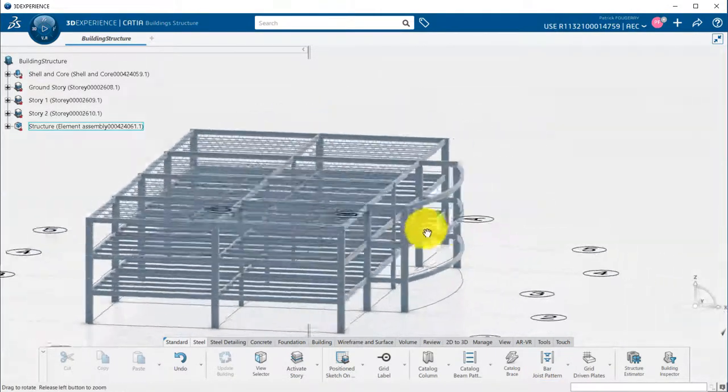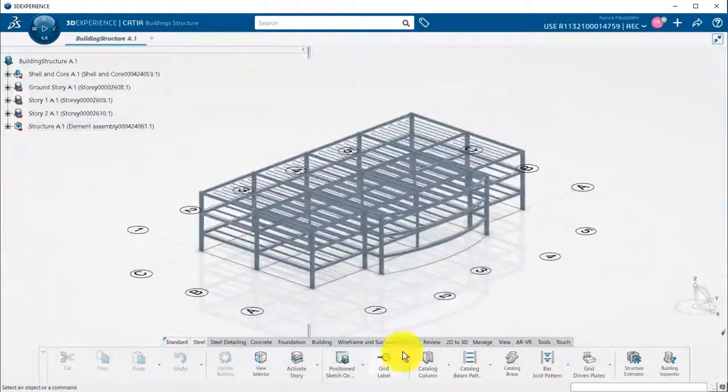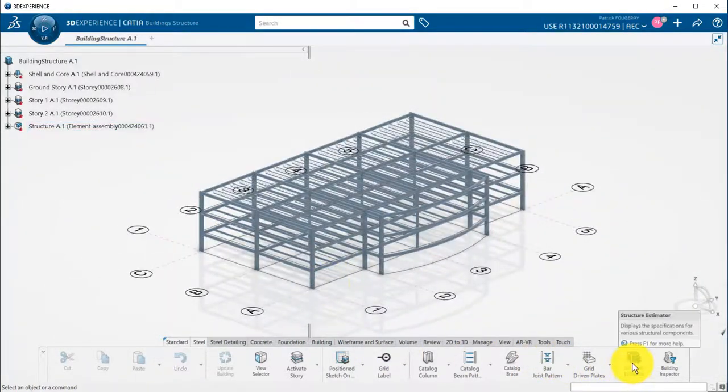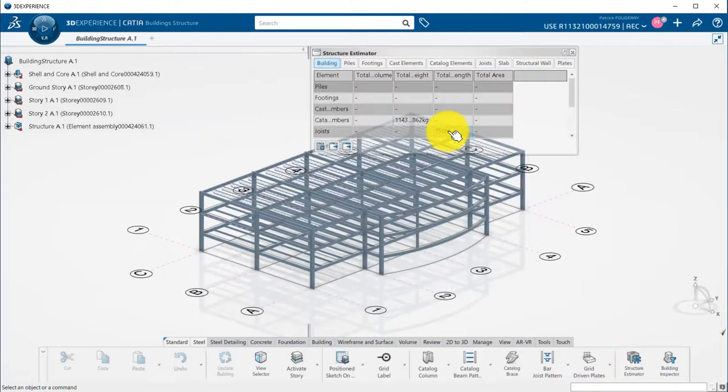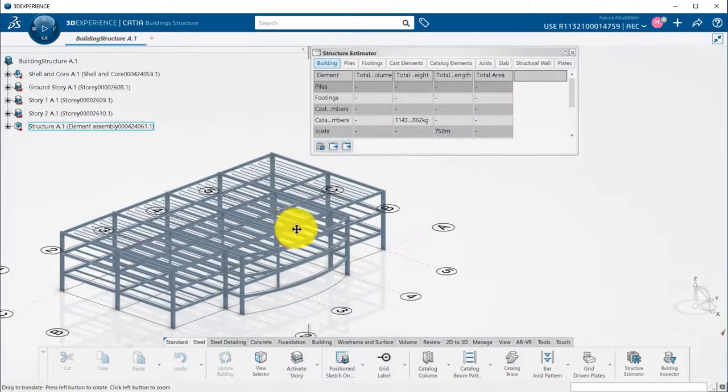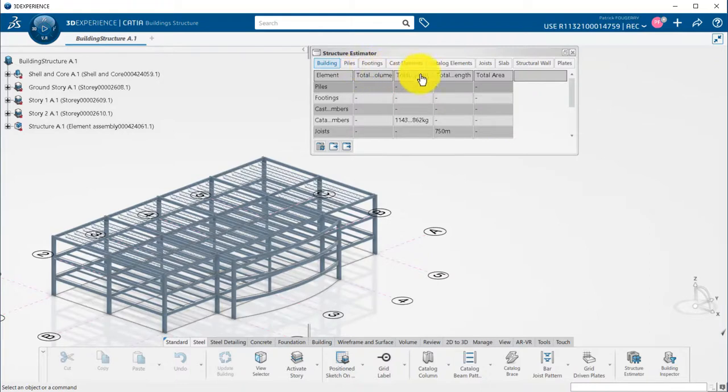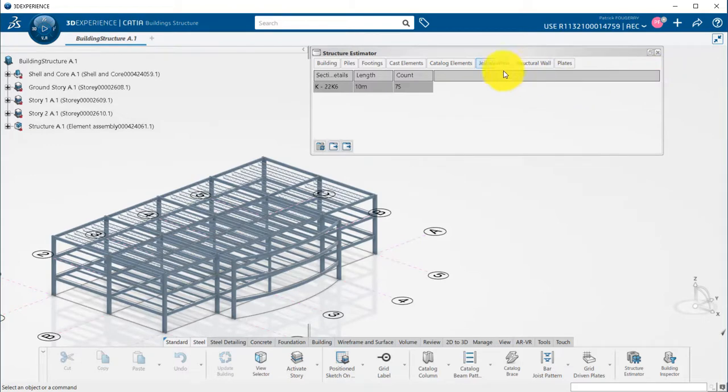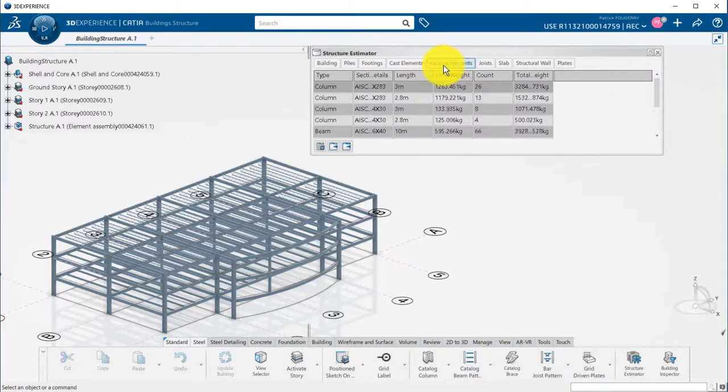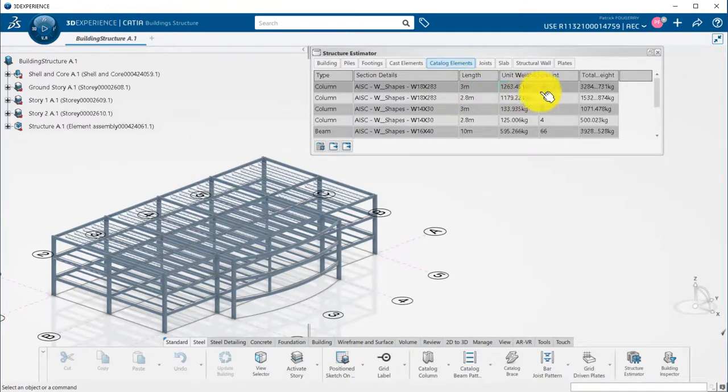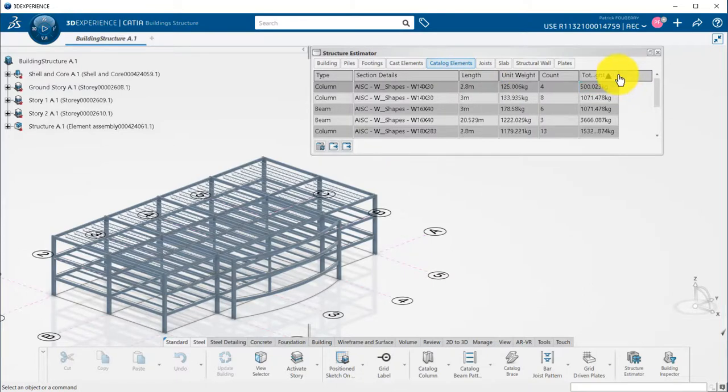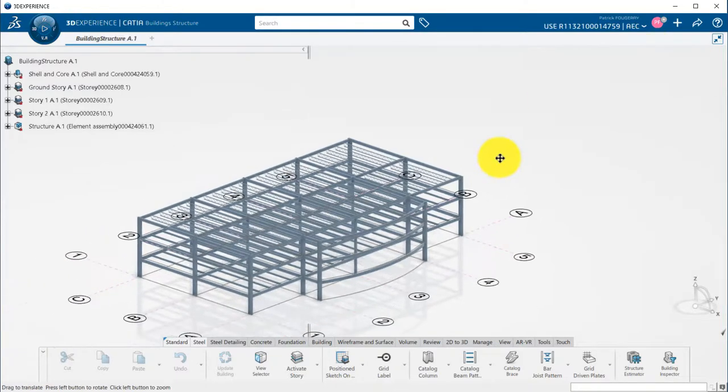If you want information about quantities, use the structure estimator that will generate a report that can be exported. You can see the total volume of structural members in the building tab. Information about trusses in the joist tab. And about beam and columns in catalog elements. There, you see the size, length, unit weight, count, and total weight of the different members.